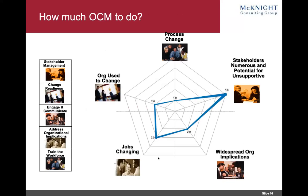How much OCM to do? I suggest you do an assessment. The metrics at a high level: are you making process changes as a result of this project — rate one through five. Do you have numerous stakeholders and high potential for unsupportive stakeholders? Is there widespread organizational implications or is it departmental? Are jobs changing or is the organization used to change — have they successfully dealt with change before, or have you wasted millions on projects that seemingly looked good but didn't get anywhere? These five things obviously map to the five areas on the left.